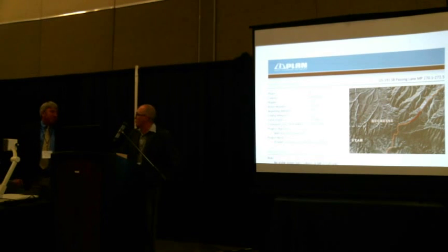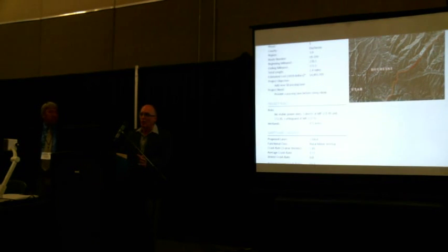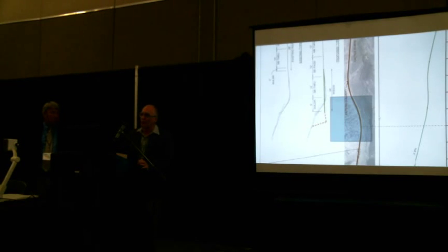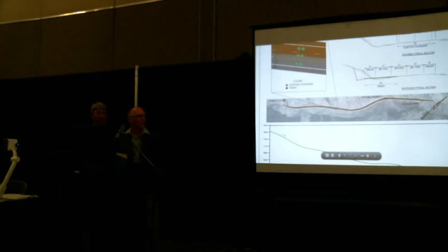It's pretty close. And what we tried to do with all of these projects is give some background information, an estimated cost, look for some of the impacts, the objective of the project, and then we also gave just a little bit of information there again from the desktop, from using the LiDAR information that planning is now developing. We've even showed how the existing is, how the new project will fit into it, and a lot of other data that the region can now pick up and move forward with and develop concept reports, get projects into the long-range plan, wherever they think they need to do with it. So with that, I'll turn it back over to Craig and Andrea, and they'll explain how the region is now using this tool, how it's fit into the long-range plan, and I think the region's even written a sequel to this story.